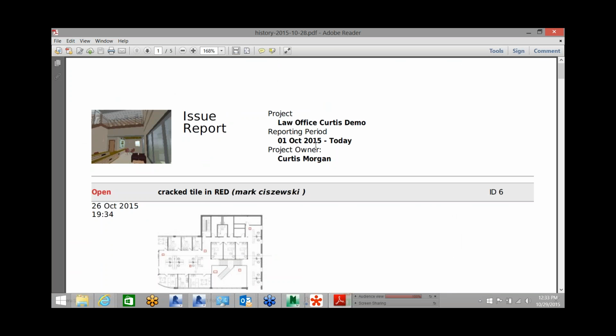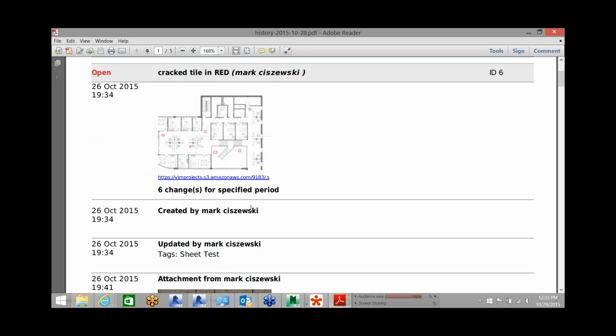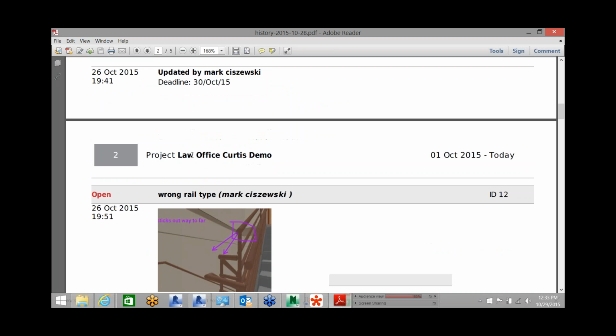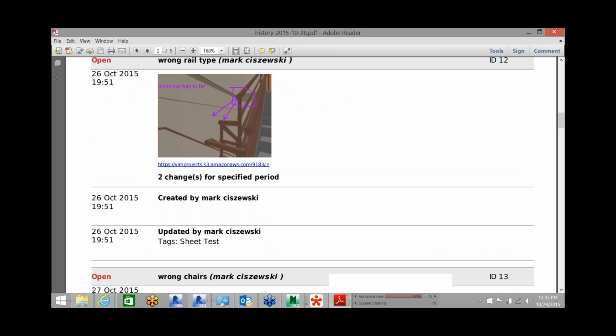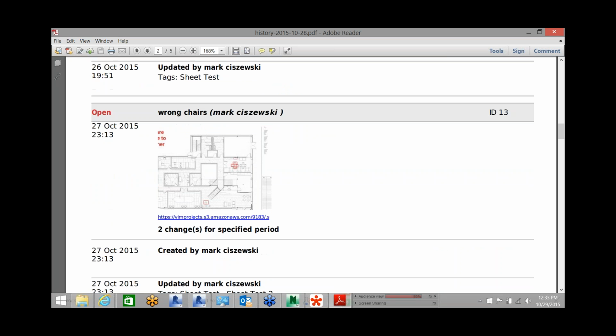In addition to the date that this is associated with, we did a report based on a tag that had multiple issues pertaining to these 2D sheets. So in this example, our sheet metal guy would only be getting sheet metal tagged issues. And for any of the new issues, we set it up so that he'd be getting a daily report, or maybe a report every other day, on new sheet metal problems.